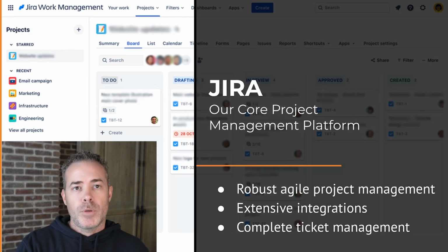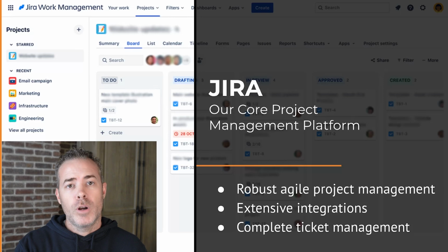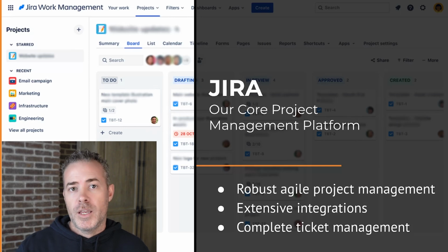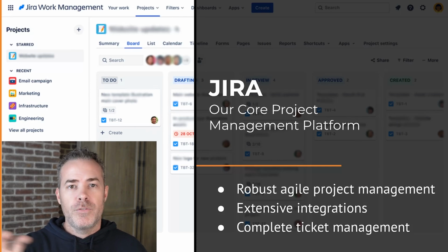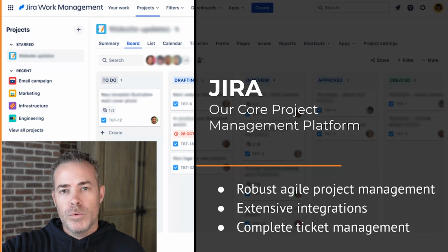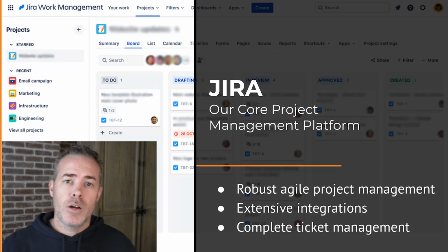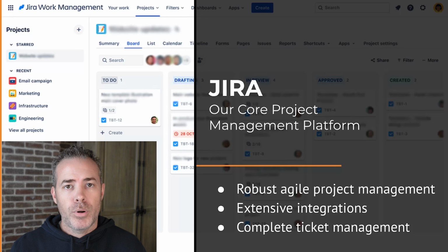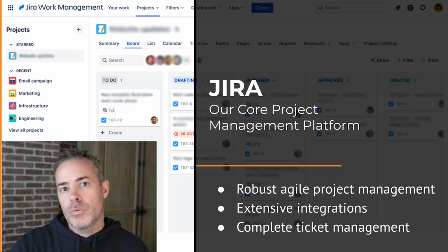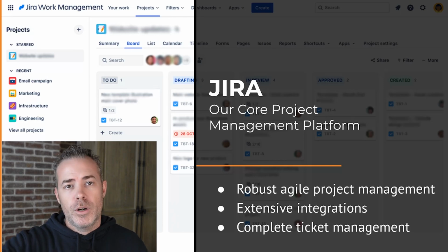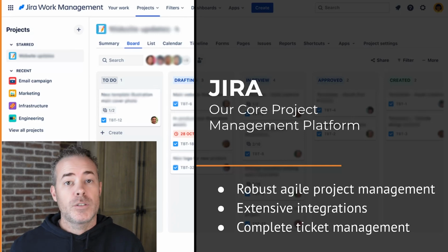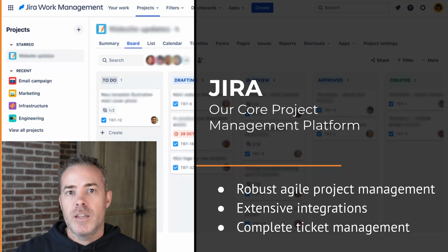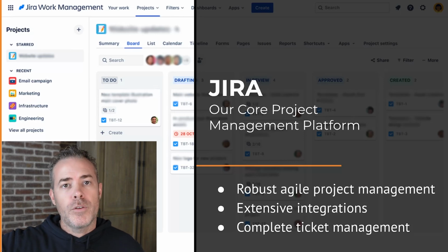In terms of setting up the project, we tend to use a Scrum project when we're in a build phase. We've got some sort of a defined body of work that we're taking. Think of an SOW with a defined scope, a defined timeline and budget. We would use a Scrum style board for that, or for ongoing product development, where we've got a full product team spun up, us along with the client as well, and we're doing our ceremonies and our process on an ongoing basis. It doesn't really have a defined end date necessarily. It's ongoing product development.